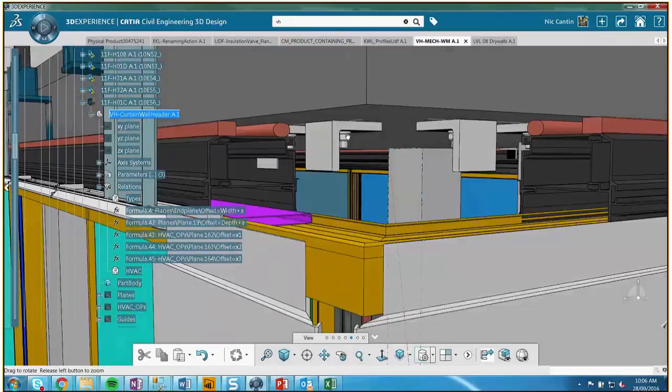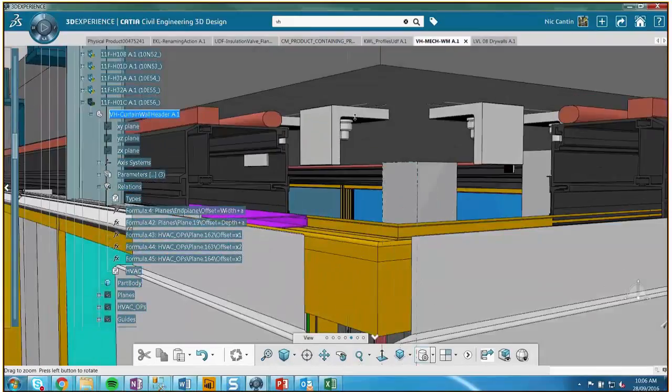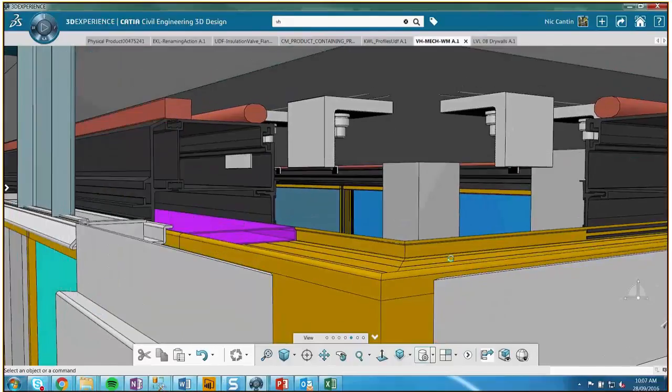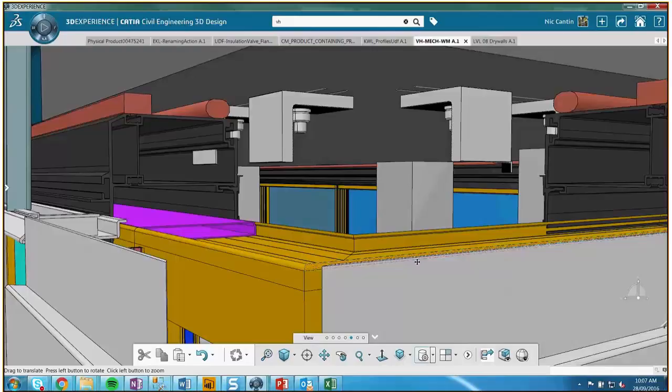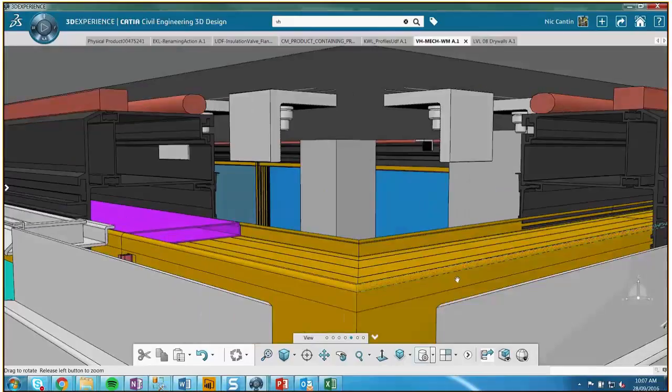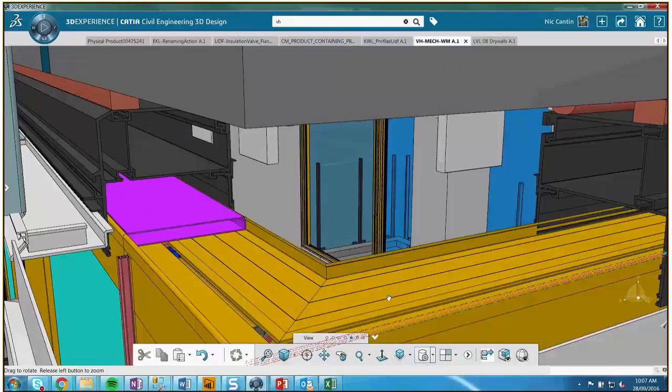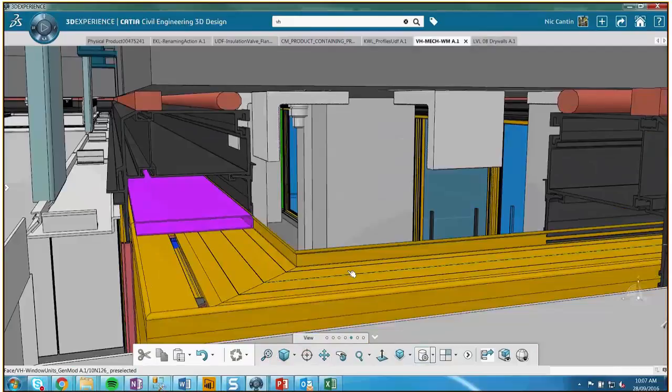The embeds are overlaid with ISA anchors, facade panels, riser penetrations. Everything's coming from this one model, from the formwork trade through to the facade fabricator. That's helping us all get in front of some of these issues as best we can and find solutions, with a final output that goes to the build. So they're building from this.